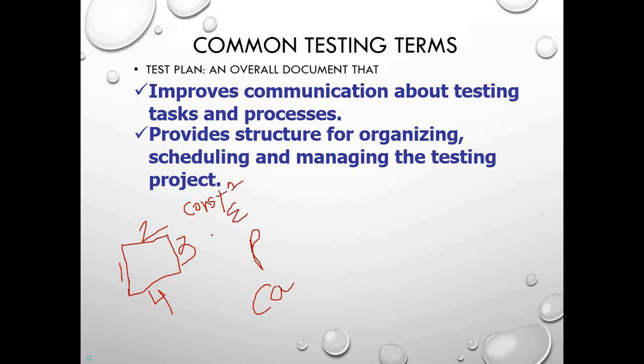These are the 1, 2, 3, 4 people who are doing the construction. If the construction person is not communicating clearly with the electrician, the plumber, and the carpet guy, these 3 areas will not even know when this will be ready for their work to be started. So all those communications need to be captured in the communication plan. On the other hand,